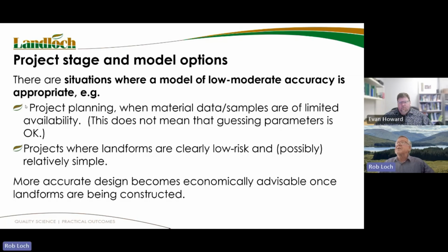So basically, when you consider the stage a project is at, there can be situations, particularly early, where a model of low to moderate accuracy is quite appropriate. For example, in project planning, you may not have any capacity to go out on the site and dig up too much in the way of materials, or for that matter, any sort of samples. It might also be where the landforms are very low risk and possibly simple. So there are situations where you might be perfectly happy with a model of relatively low accuracy, such as an